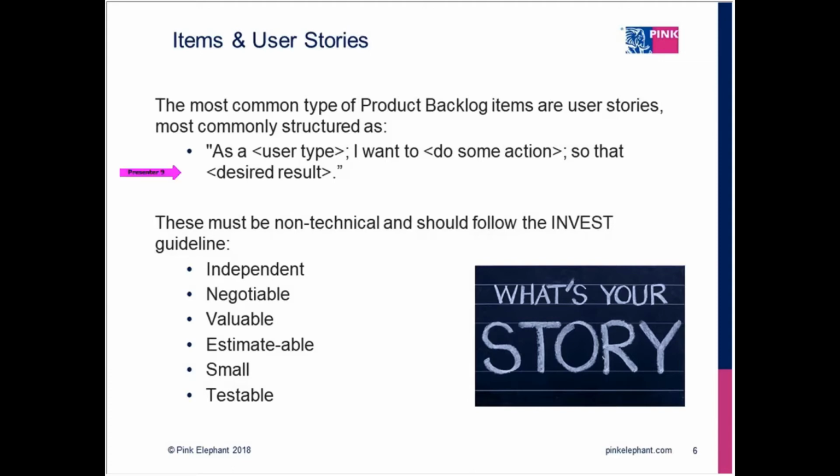So these are the three basic elements that go into the product backlog stories, right? Roles, what is the role doing, some type of action, and then what's the outcome of that action. Okay, and so very simple to create these. And again, don't worry about getting it right. It's enough information to start a conversation.